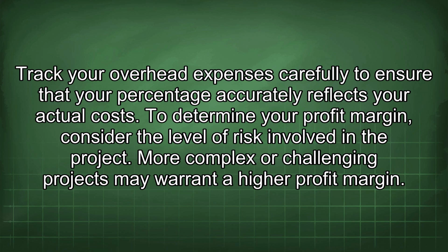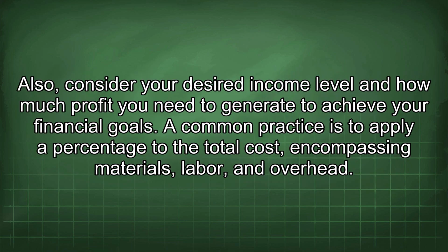To determine your profit margin, consider the level of risk involved in the project. More complex or challenging projects may warrant a higher profit margin. Also, consider your desired income level and how much profit you need to generate to achieve your financial goals. A common practice is to apply a percentage to the total cost, encompassing materials, labor, and overhead.